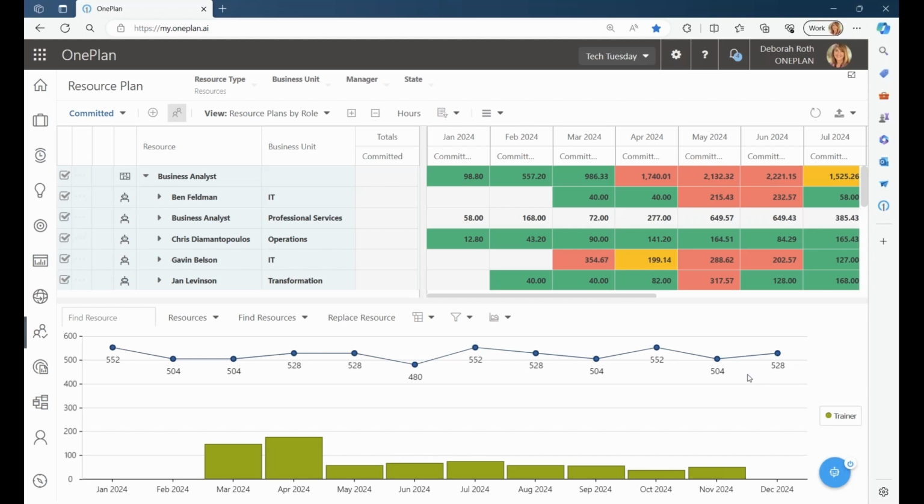So you can see how the candidates list, along with the resource plan, helps you to identify and analyze these resources, capacity versus demand, to help you match the resources to the work based on the role. The capability as a resource manager helps you optimize, balance the workload, and then identify those potential gaps that may require you to look at hiring decisions or pushing projects out. I'm going to turn it over now to Tina in the time we have left to show you another tool that you can use to help you with your resource planning, and to demonstrate how the individual work plans and the global resource planner work together.